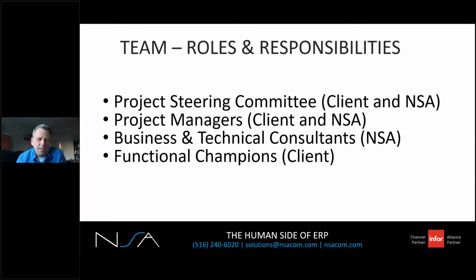So for the steering committee, what is this? So this is your executive level involvement for the project. So whether you're big or small, this may vary considerably, but the project managers will be keeping the executives up to date. Typically, pre-scheduled meetings where you will identify the areas needing their support. So the role of the steering committee is to provide resources to meet the project objectives, and then make the go, no-go calls throughout the project when problems come up.